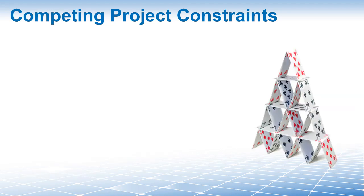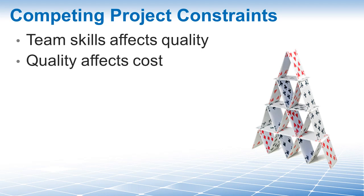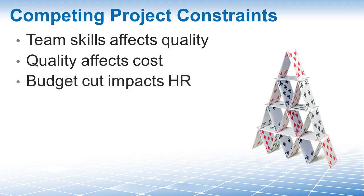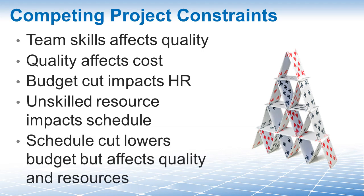Here are some examples. The skill level of your resources will affect quality — the better they are, the higher quality you can produce. Increasing quality requirements will affect cost — you have to invest more time into delivering high-quality products. If you cut your budget, that means you cannot hire skilled resources. If you have unskilled resources, that will affect your project schedule — it will most likely take much longer to finish. And if you then cut your schedule back by two weeks, yes, that will lower your budget, but it will also affect your quality and resources. As you can see, competing project constraints — one can affect one or many others.